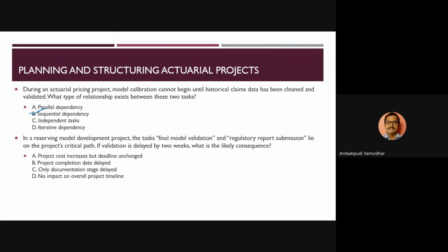In a reserving model development project, the tasks final model validation and regulatory report submission lie on the project's critical path. Okay, we just now talked about what is critical path. If validation is delayed by 2 weeks, what is the likely consequence? Project completion date delayed.